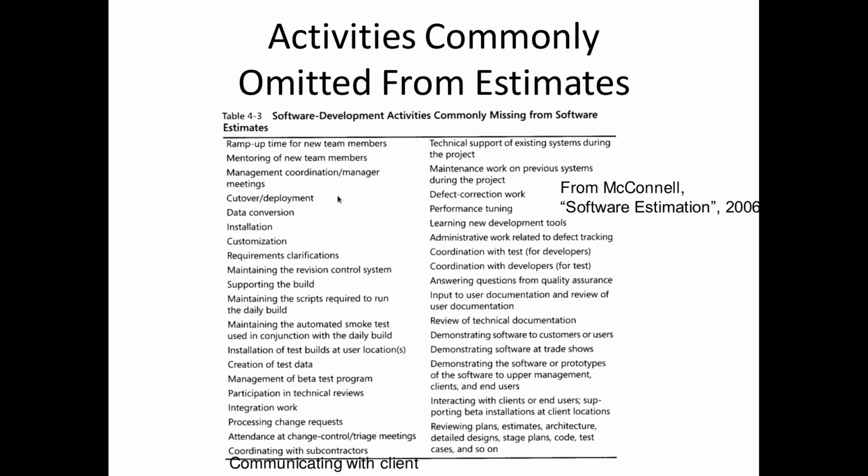Even given our uncertainties there, we tend to forget about a lot of features when we give out a number. And at least if we're giving out two numbers, a worst and a best, it forces us to think through, what am I forgetting? What am I not considering? How could it be worse? What could take longer? Right? Maybe you start remembering,